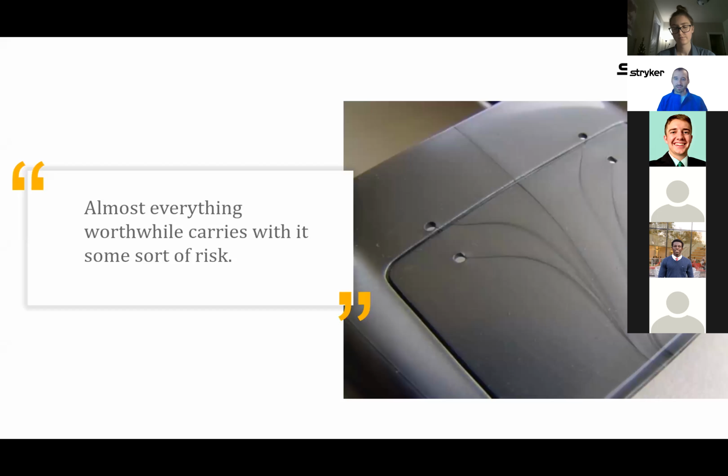So once again, spend some money, which is not always bad. It's good to spend a little extra money, and you can justify it, to make sure we had extra parts in house. And what happened was all of the tools except one were fine. They were good. So we took all those parts and just threw them away. Like, yeah, well, it's fine. One tool was broken, and the timeline of a tool was 4 months. So once again, 4 months, $1 million a day. You're talking a huge downside that a lot of projects don't think about.